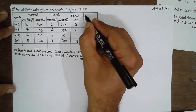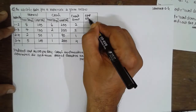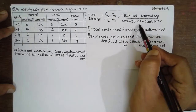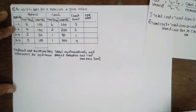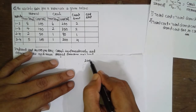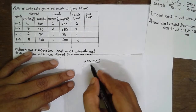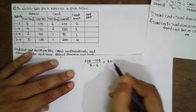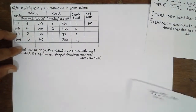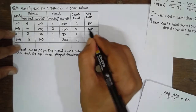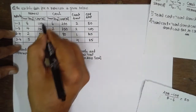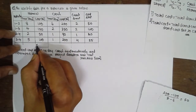Now we are going to find out the cost slope. The formula for cost slope is: crash cost minus normal cost divided by normal time minus crash time. So 200 minus 100 divided by 8 minus 6, the answer is 50. Write 50 here and follow the rest of the row: 50, 100, 40, 25. Do the sum here: 100 plus 150 plus 50 plus 100, the sum is 400.